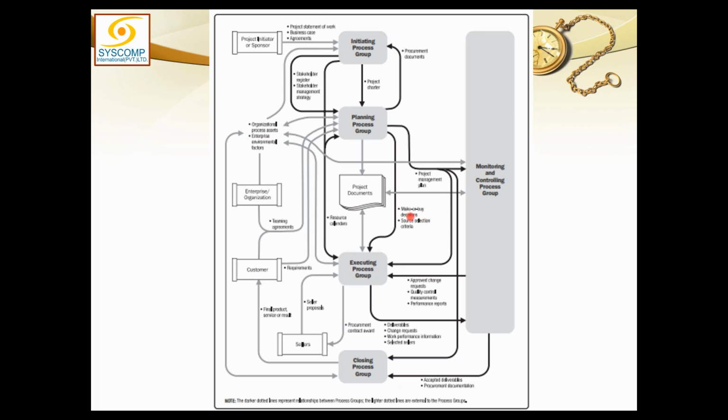Means you don't want to make, you want to buy. That simply means you have decided certain jobs are to be outsourced. So those decisions, along with all those items which you decided to outsource, how would you select the contractors for that? That is the source selection criteria.